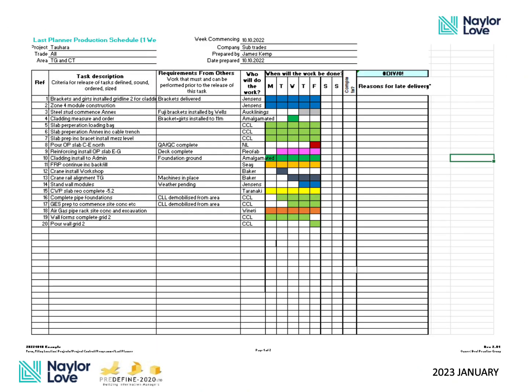To test our idea, we picked up the Last Planner Excel table from one of the weekly planning meetings. We also limited the exercise to the main building. We wanted to color the areas of the works nominated to be performed by various trades the same color as shown in the table, and on the post-it notes. However, we did not want to change the model colors the authors have assigned to them. Instead, we used Revizto's appearance profiles and template features.